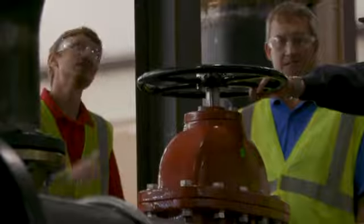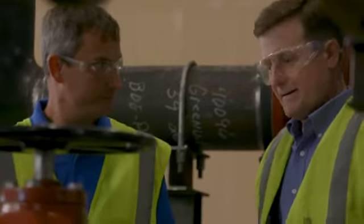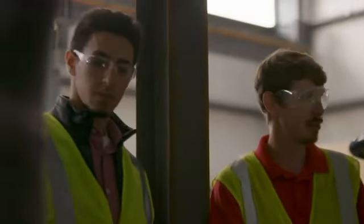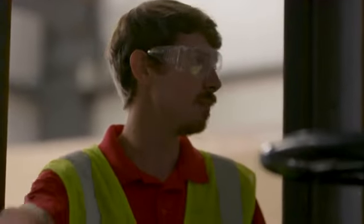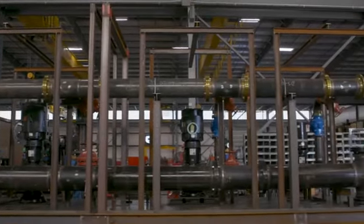So during the design process as well as the submittal process, working with the Grundfos Engineered Systems was very straightforward. They were able to provide us recommendations that were very useful and that were actually incorporated into the design. They had the expertise, they had the electrical engineers, they had the technicians, and they had the factory that was big enough to build what we needed. We were able to cut approximately 3 months off of the construction time by having the Grundfos Engineered Systems prefabricate a pump station for us to deliver the necessary water pressure.